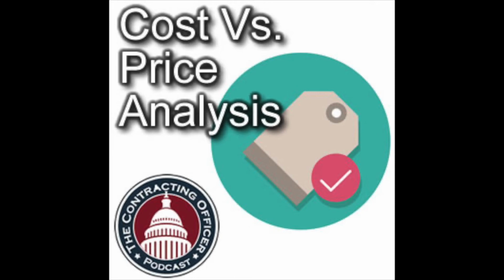The contracting officer shall ensure that the effects of inefficient and uneconomical past practices are not projected into the future. So again, this is a thinking job. They're saying, okay, just because this is how it happened last time, let's not apply that same principle going forward. That is very different than the last topic, which was pricing. In pricing, you're exactly doing that, because you're like, well, this happened before, let's do it again and assume that it's going to be the same.